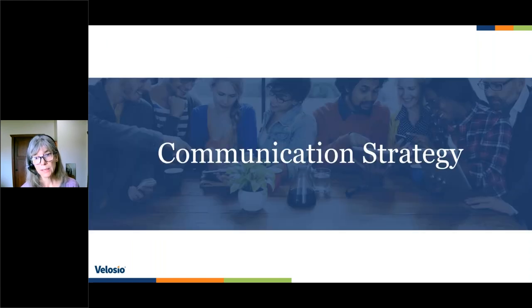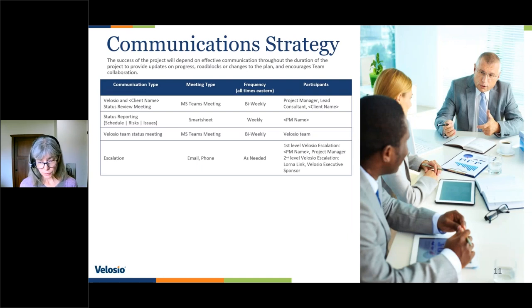So on the communication strategy, I brought this slide in because I wanted to make sure that what we have, the 120 days, we will have hopefully either a weekly or bi-weekly status review meeting. And what that is, we get your project manager, your lead, and you in this meeting, and we walk through the project plan, we look at high action items, we look at high issues, and we make sure that we are on track and can make some decisions if we need to in that meeting.